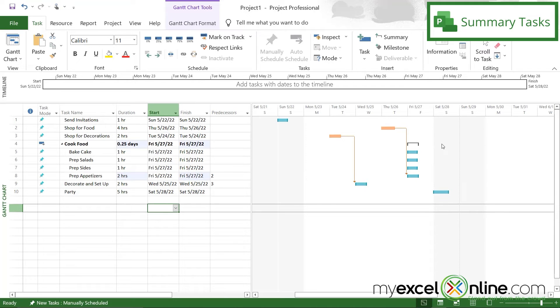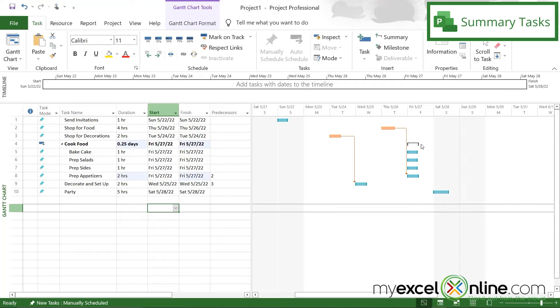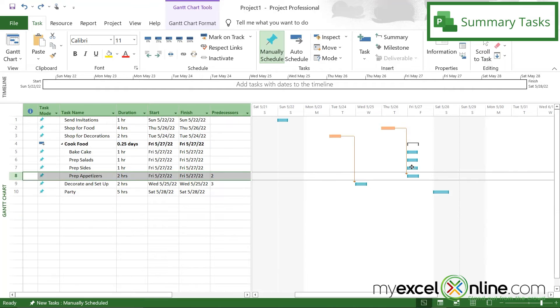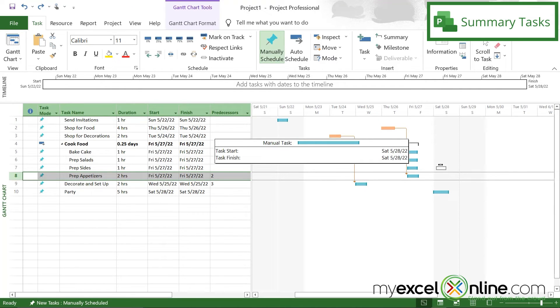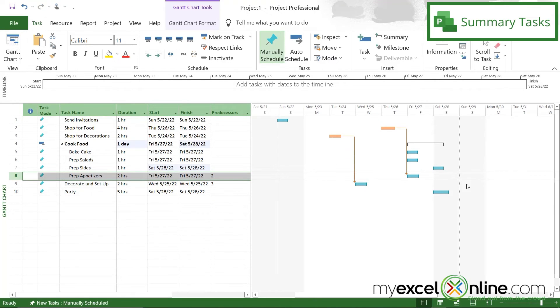So now what you can see over here is this bracket has been placed, and what this bracket means is that this main task is made up of these subtasks that are underneath. So if I were to drag any of these tasks over to another day, you can see that my summary is widened to compensate for that subtask under that main task.